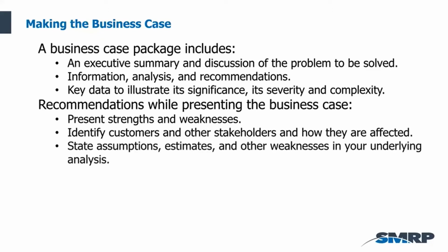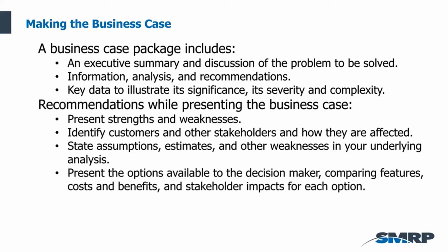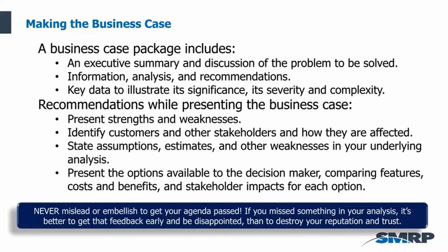You want to be able to identify customers and other stakeholders and how they will be affected. You should state the assumptions, the estimates, and other weaknesses in your underlying analysis. Present the options available to the decision makers, comparing the features, costs, and benefits, and stakeholder impacts for each option.